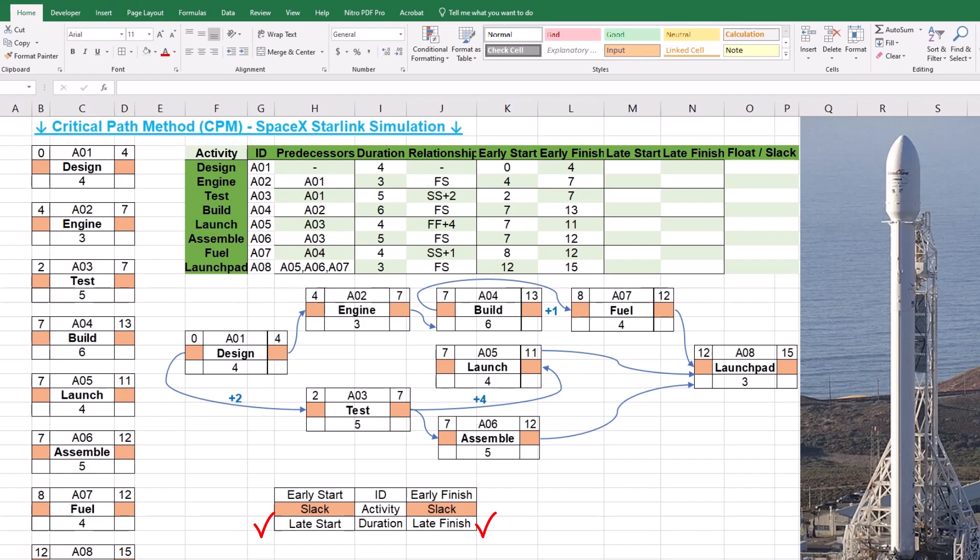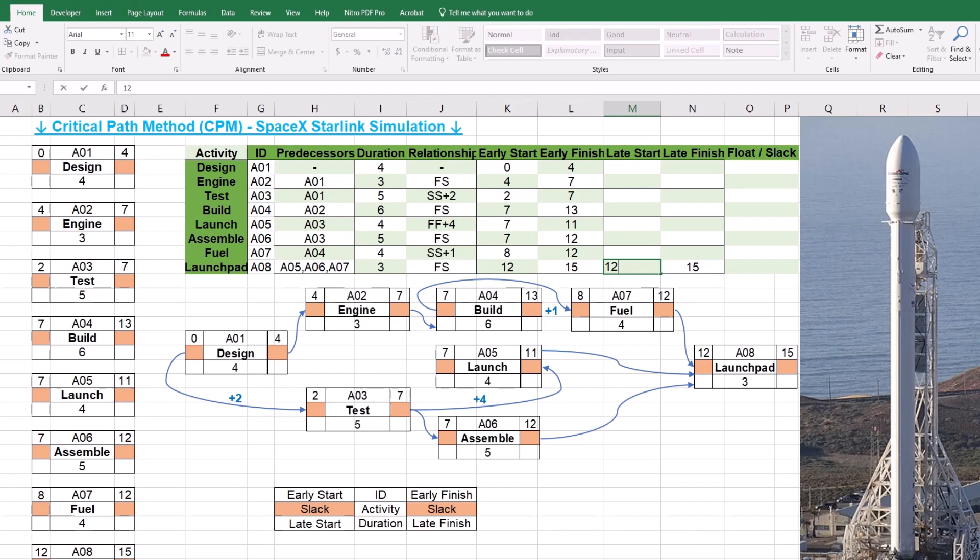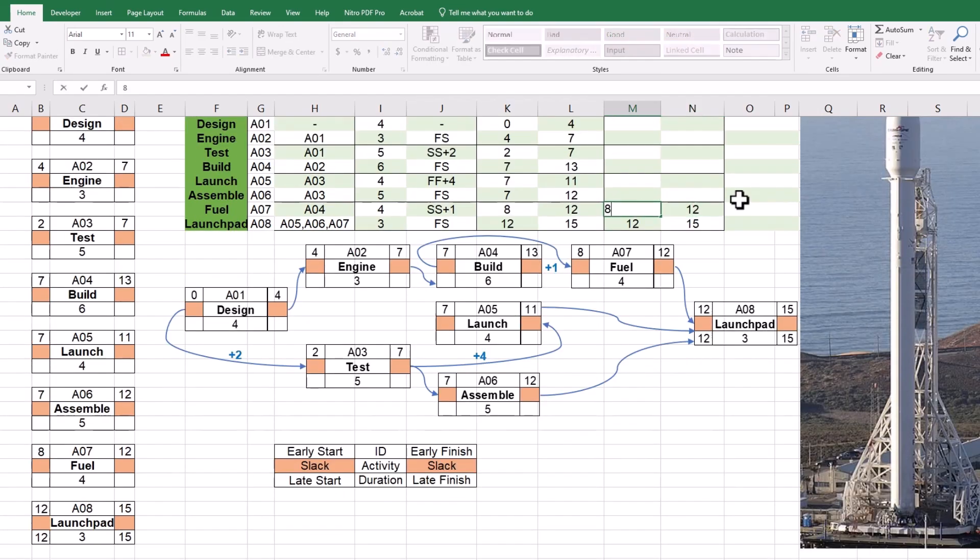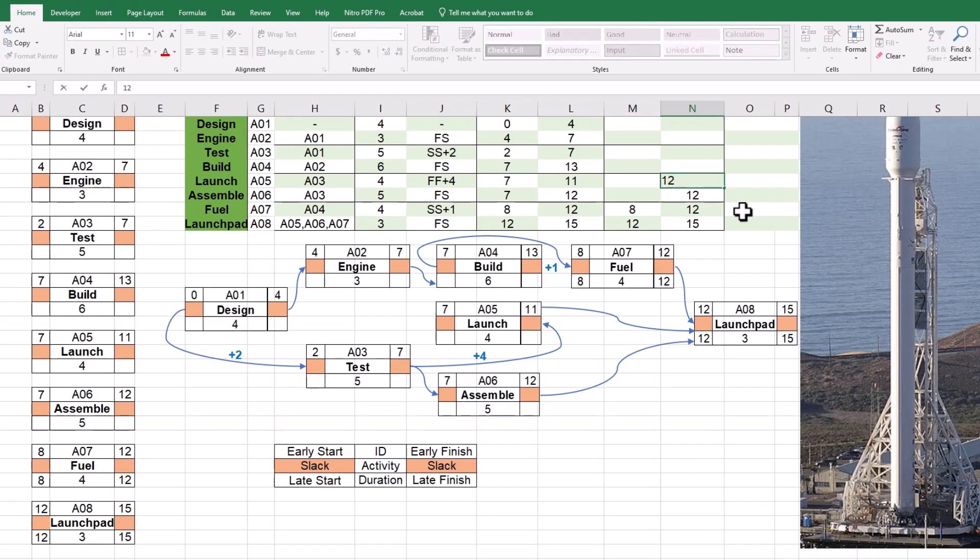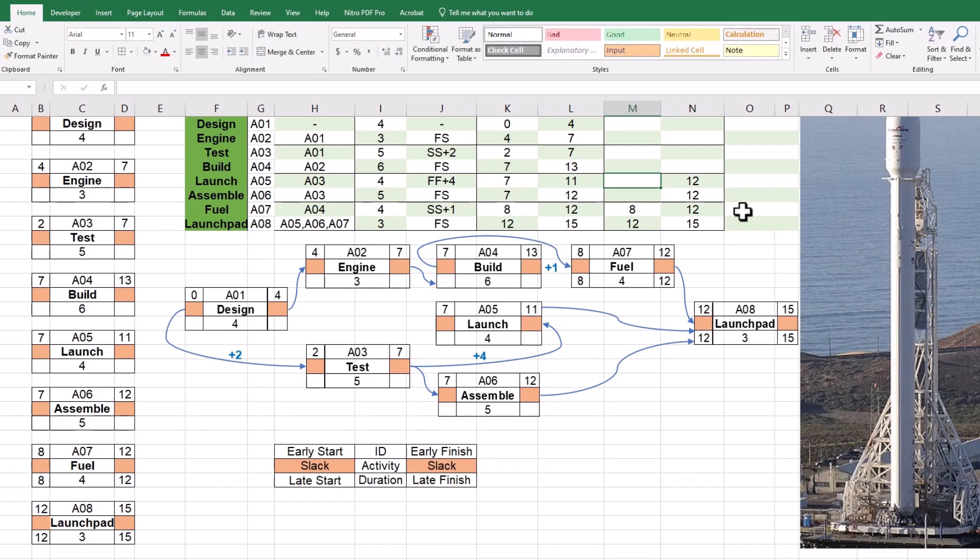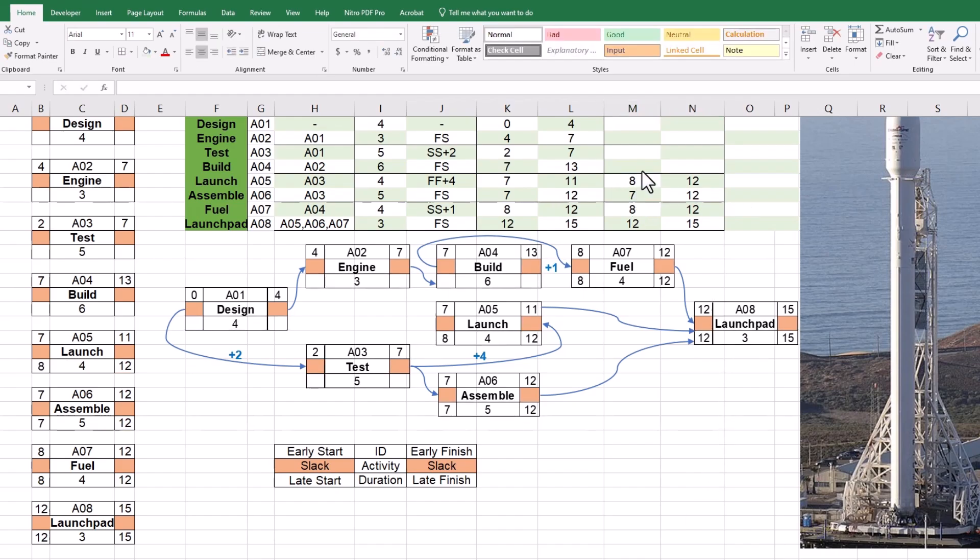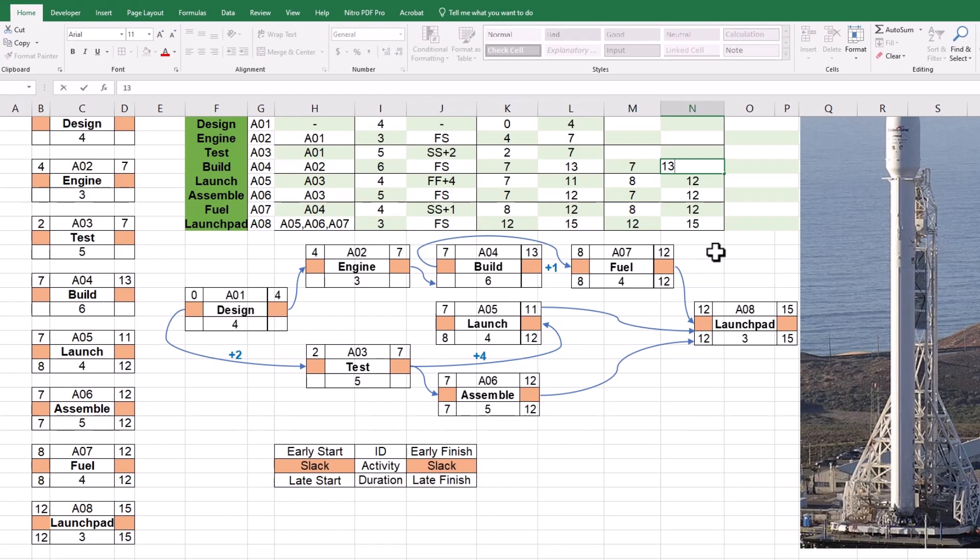Late start and late finish of activities are calculated in the backward path on CPM when we move from the right to left-hand side of the network. For activity A8, the late finish will be 15. Since the duration of 3, the early start is 15 minus 3 or 12. The linked activity of A7 will finish on the same date of 12 and considering its duration of 4, the late start date is 8. Continuing the backward path, the late finish of activities A6 and A5 is 12 and the late start is found by deducting their durations. Late start of activity A4 is found considering the start-to-start relationship with the lag of 1. In the backward path, we should deduct the lag to find late start of 7 for A4. Its late finish will be 7 plus duration of 6, which is 13.